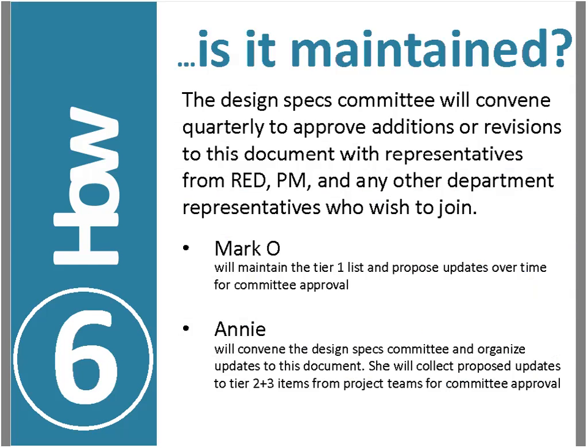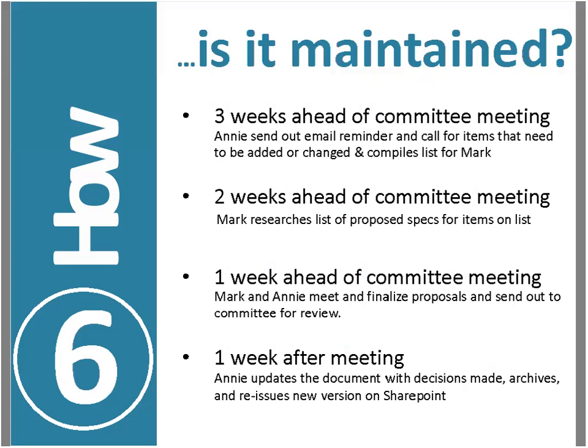The other piece is that we didn't want a big, beautiful book that would need a lot of maintenance, because there's not really a dedicated person. It's way more useful if it can live on, so it's more of a process than a finished product. I'm representing the real estate development folks and the design side, working closely with our property management folks to have a regular quarterly process where we revisit these things and capture new lessons. We continue to capture those conversations that are already happening in our development meetings, and have a regular structure to keep it updated so that it continues to be useful.